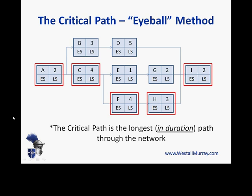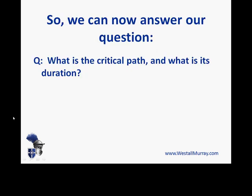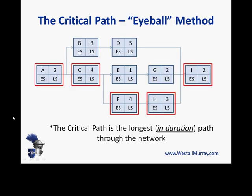Note that the longest path in critical path terms is the longest duration, not the path with the most number of boxes. Sometimes people think longest path means the greatest number of boxes. In this case, there are two paths — A, C, E, G, I and A, C, F, H, I — both of which have five boxes in them. So that's not how you calculate the critical path; it's the longest duration. We can now answer: what is the critical path and what is its duration? It's A, C, F, H, I — 15 days.